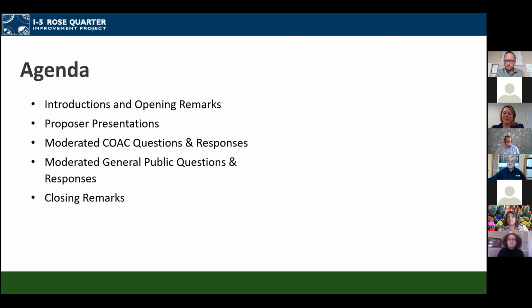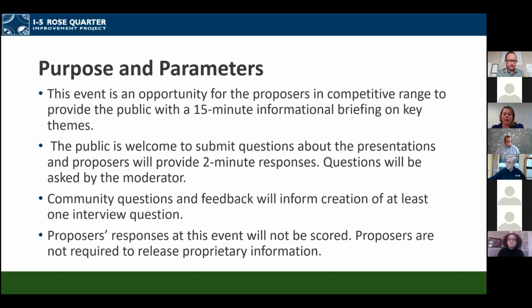Hi, thanks, April. I don't have much to add about the project. The Urban Mobility Office pretty much hit everything on that. Just as an overview, the CMGC, which is to acquire the services of the construction manager and general contractor, will be initially for the pre-construction phase services. And then we have provisions in the contract to later add the construction phase, through early work amendments and the GMP amendment. I really appreciate the opportunity to be here and to be involved in this process. Thank you.